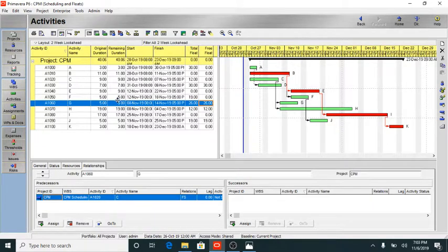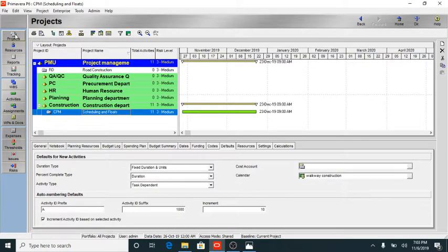Here you see G activity, original duration 5 days to complete. In any case this activity is delayed, we got 26 more days to complete this activity. Its successor activity H isn't affected. If this activity is delayed, its successor activity isn't affected. So we also got a total 26 days free float. I hope you understand. Now scheduling.